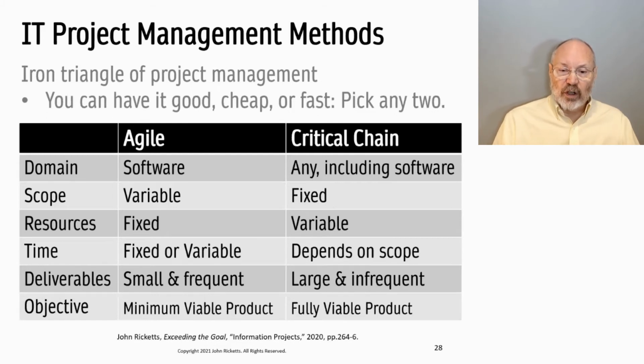And rather than produce 100% of the requirements, if you can produce the 20% that's really critical up front, you accelerate the business benefits. And if you never get to the other 80%, then you conserve on your investment in that IT solution. So the minimum viable product says do the most important stuff first, and the less important stuff you may never get around to, and that's really okay.